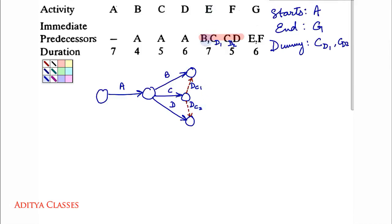So E was waiting for B and C. Here we have B. We do not have C but rather we have pulled C. We have pulled C through a dummy to this point. So here we have B and C. We can have E.